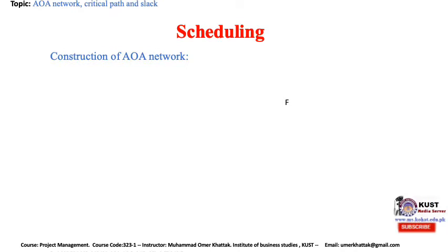The first thing we need to do is draw a node which is going to start the proceedings. This is going to be called 1. Then as we have to denote all the activities on the arrows, we draw the first activity arrow from that node, and we call it activity A. Now, activity A finishes up into another node, which would be an event, and this would be called 2. Previously we would write all the activity names on the nodes. Right now, this is an activity on arrow network where we have to write the names of the activities on the arrows.